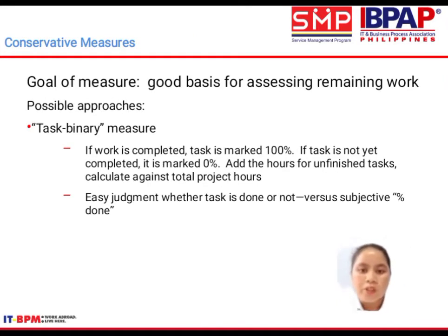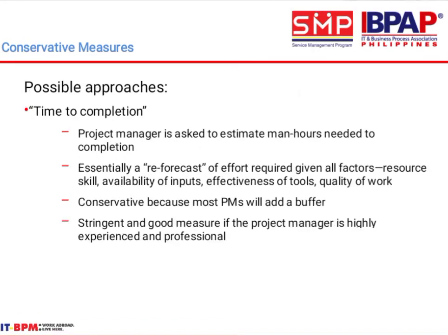The goal of the measure is a good basis for assessing remaining work. Possible approaches: task binary measure. If work is completed, the task is marked 100%. If the task is not yet completed, it is marked 0%. The hours of unfinished tasks are calculated against total project hours. It is an easy judgment whether a task is done or not, versus a subjective percent done.